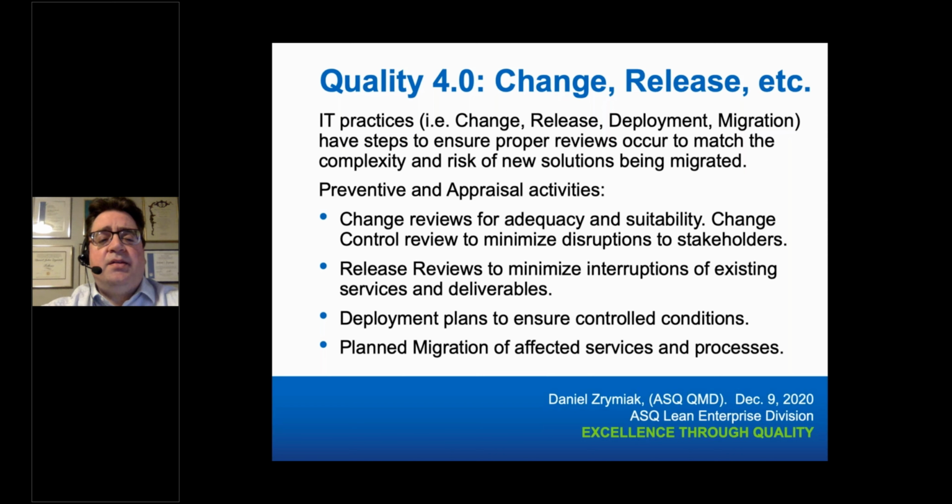And then deployment represents the point of change. After that, there's the migration of affected services and processes. So if prior to November 30th, you're using two-dimensional designs, and then as of December 1st, it's now three-dimensional, making sure that everyone involved knew to cease doing things the old way and we're adopting the new way. So that involves training, that involves getting confirmation from the people doing the work that they can follow through, and then coming back to the training, awareness, and competence. Competence is monitoring that after it's migrated, everyone is capable of doing their work.